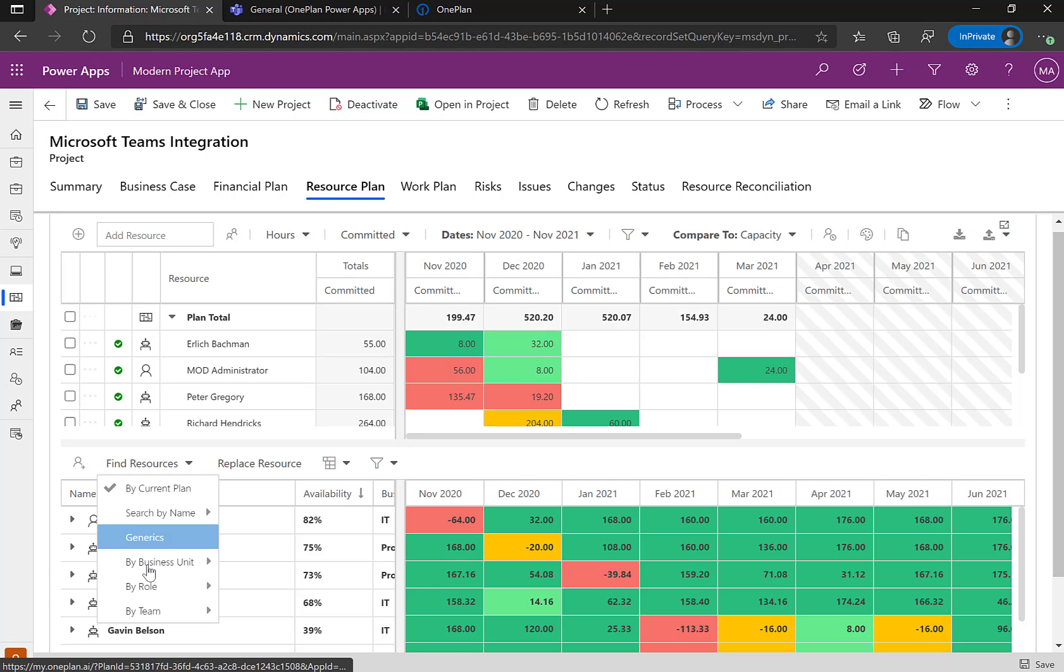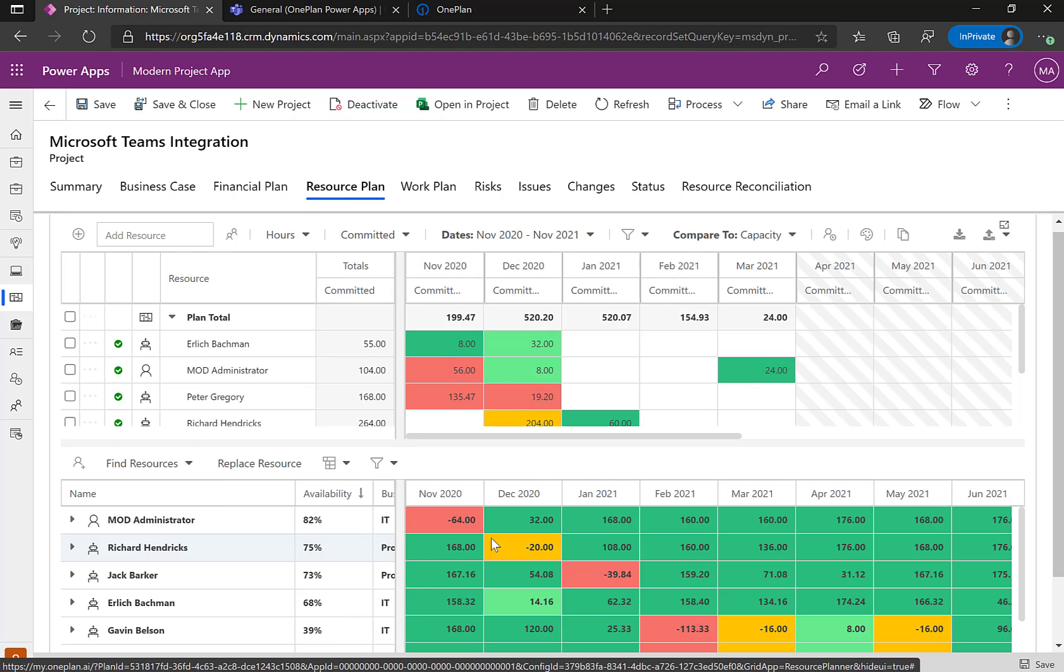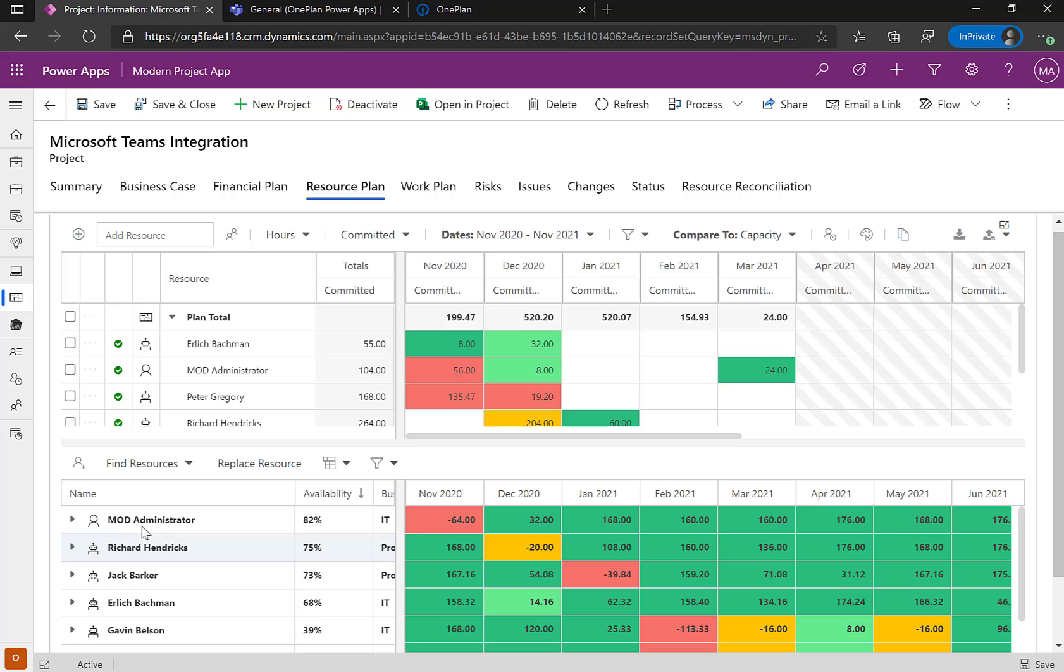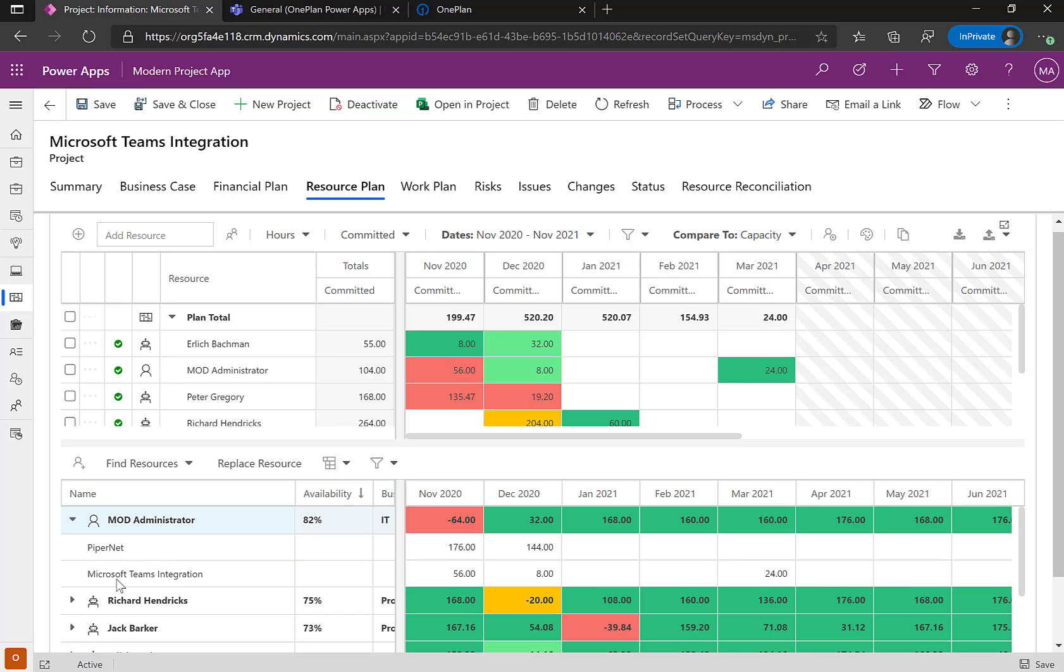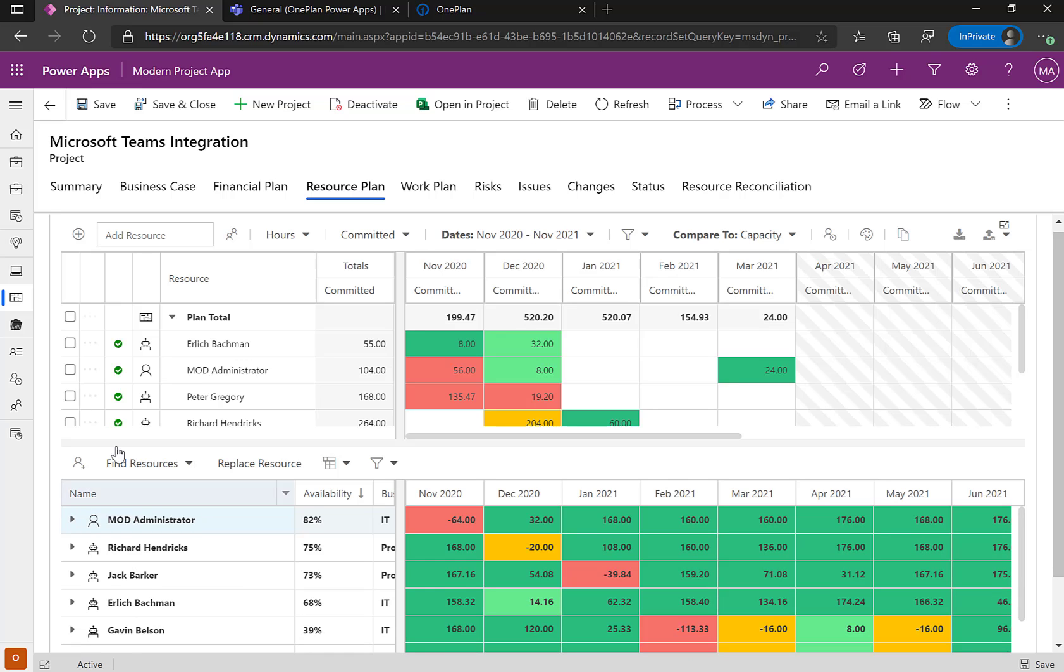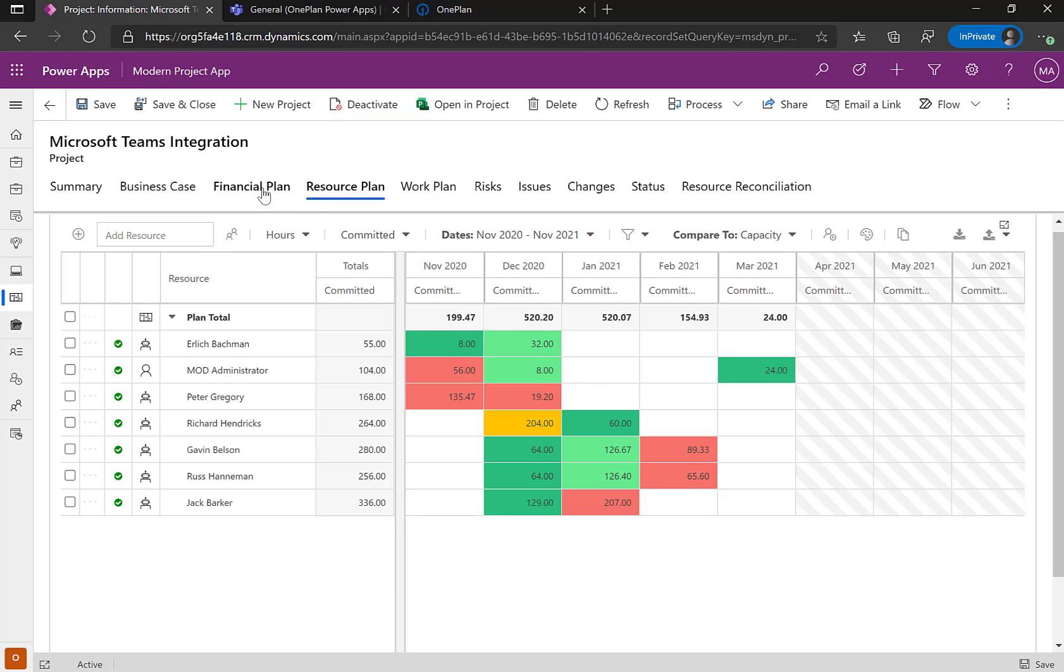And so now I can see what resources are over allocated and I can actually view this across multiple projects. So if I go down here, by current plan, I can see quickly here, this is me and I can see that I'm actually working on two different projects at the same time, which is creating some over allocation. There are all sorts of things we can do with negotiation and comparing it to schedules and timesheets, but just kind of showing how the project schedule populates the resource management capabilities in here as well.